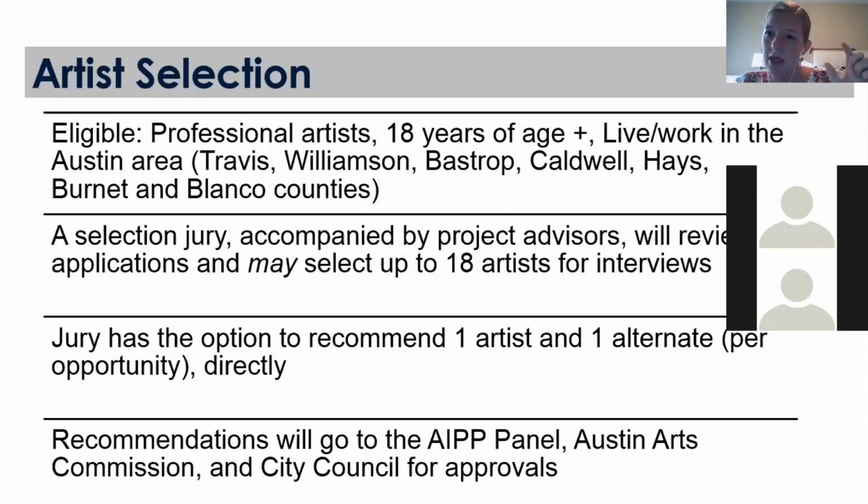There's going to be a design contract and a commission contract, so there'll actually be two sets of milestone payments. Usually the budget is divided up with about 20% going to design, and then 15 to 20% of that 20% would go as an artist fee. And then there's milestones when you present the design to the panel and it gets approved at mid-design and at final design.